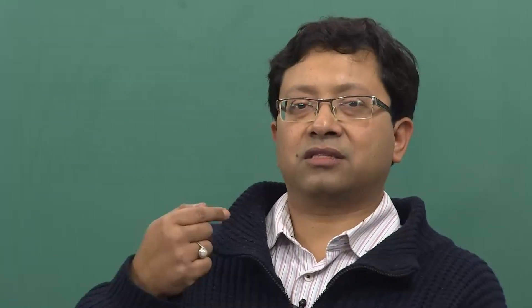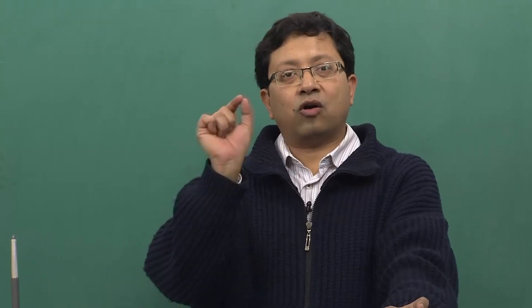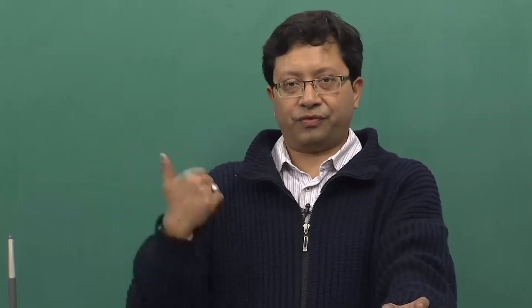We started this problem at the end of the thirtieth class, continued in the thirty-first class, and in this thirty-second class we will try to wrap up the discussion. The overall job sequence of crashing is now being done on three accounts marked in red — activities C, D, and E — simultaneously by one day each, causing a decrease from sixteen to fifteen days.